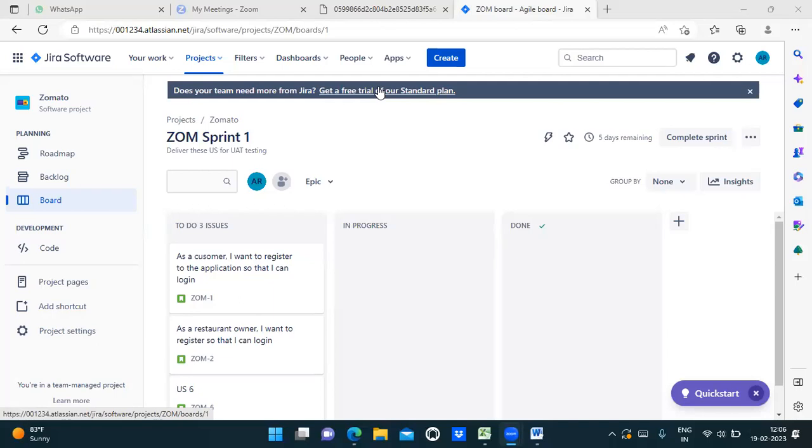As you said, the team will not take any kind of change request in between the sprint duration. But we are aware that Scrum welcomes changes, right? Yes. So the changes that come will be added to the product backlog. Thus, yes, Scrum does accept change requests, guys, but they will not be added to the sprint. That is what I'm telling you.